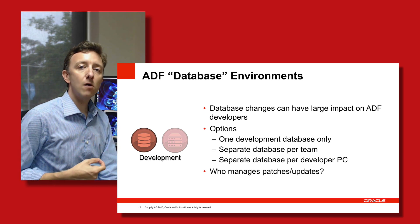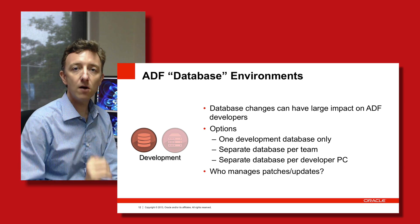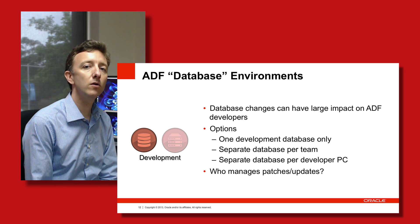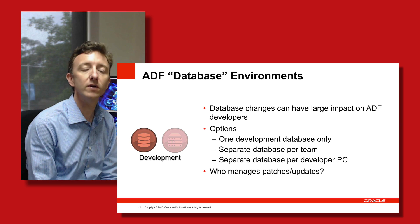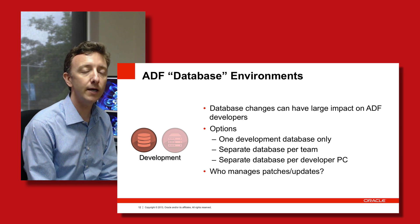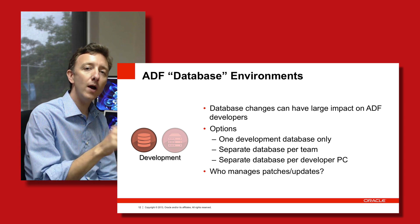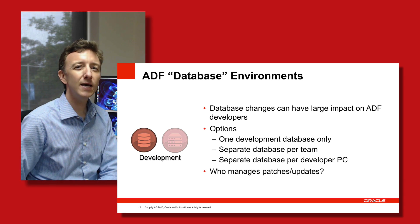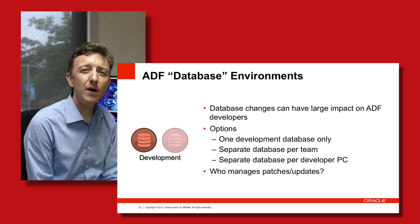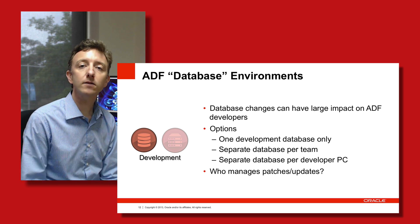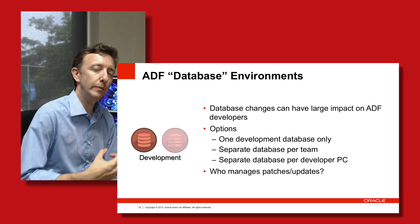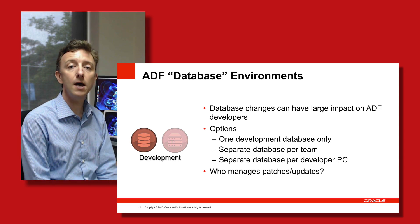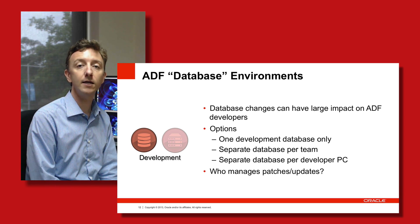With a shared database, changes are uncontrolled and developers might find their code is broken just the day before they deliver to test. So you have an interesting challenge: you need to consider how database changes impact the developers and when developers will actually encounter those problems. Another consideration is when the development database goes down for patching and updating, and who does that work. The DBAs have that skill, but from the developers' perspective you need to understand that this work will impact them — this is something from a procedural and process point of view you may need to consider.